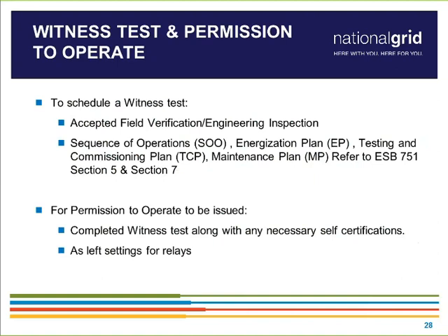I just want to note that sometimes, so with more simplistic projects, sometimes the energization plan and testing plan would be one and the same because of the simple nature of the project. Those two terms separate as the projects get more complex. But for a simple installation like we were showing, a lot of times those plans are one and the same.